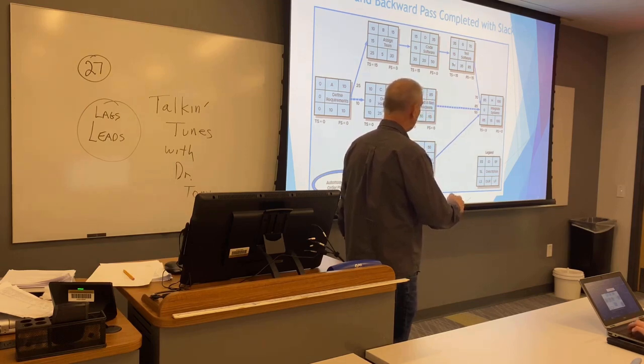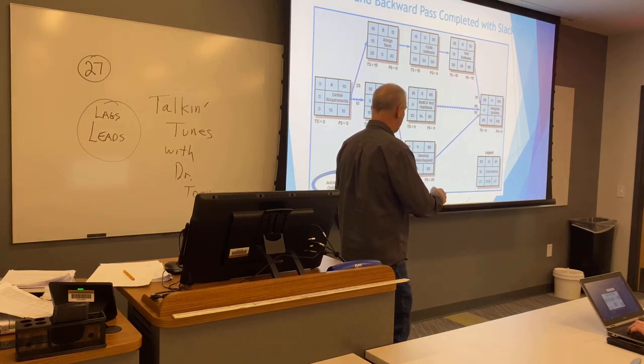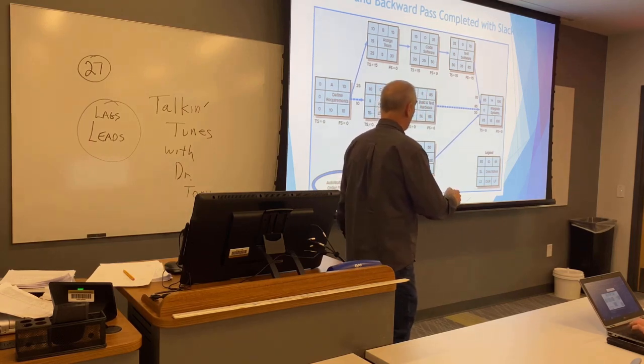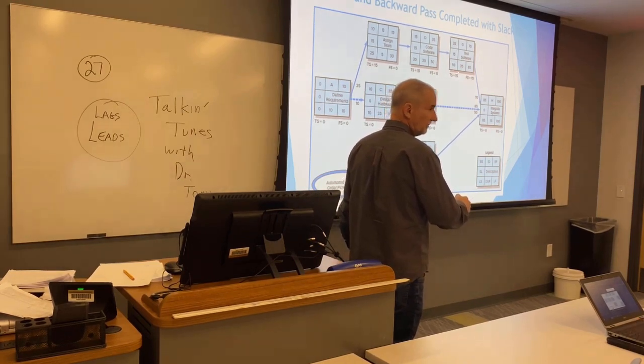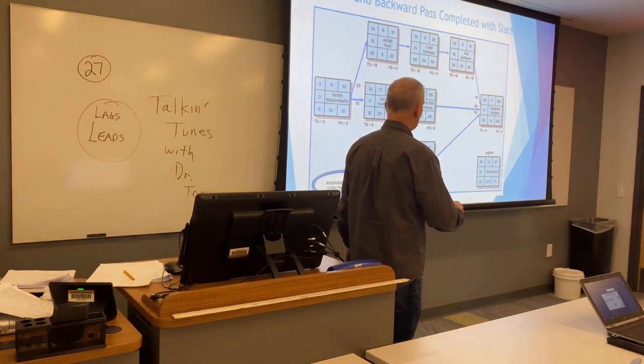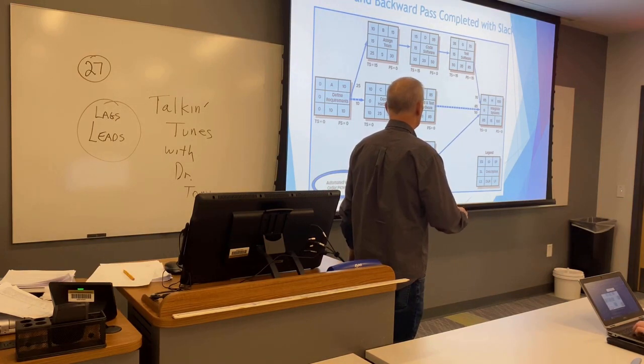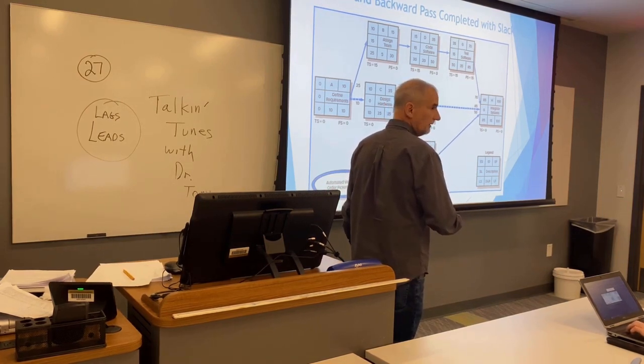You with me? Once you have that, you're good to go. Because then you got to come up with this number here. Right now, this is still blank. This is not blank. So 85 minus 35 is 50. You with me? 85 minus 50 is 35. 85 minus 15 is 70. Got it? If you can do this, you can do the rest.